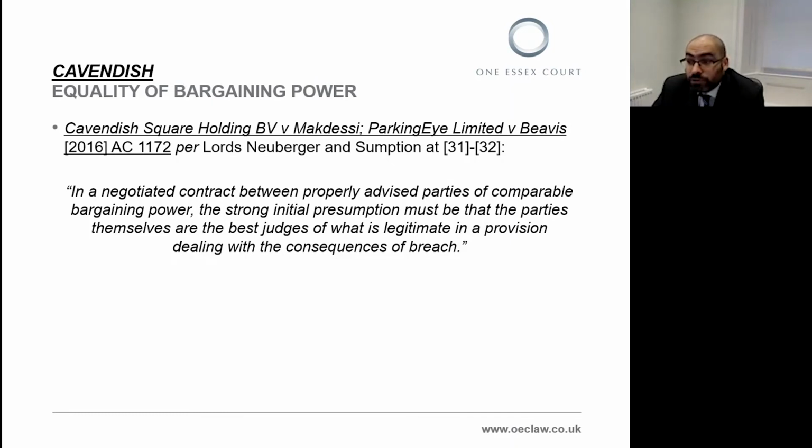In practical terms, the courts are going to be less likely to find that penalty clauses exist in such complex commercial contracts, precisely because the parties can be trusted to identify their own legitimate interests and draft clauses which proportionately protect those interests.